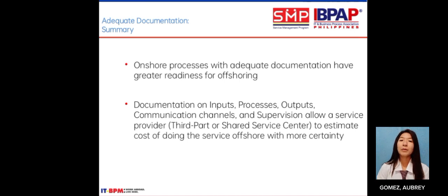Documentation on inputs, processes, outputs, communication channels, and supervision allows a service provider or third-party shared service center to estimate the cost of doing the service offshore with more certainty.